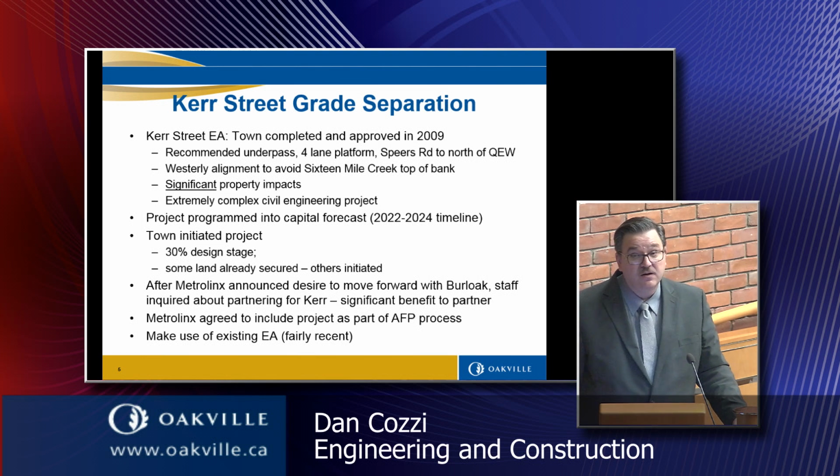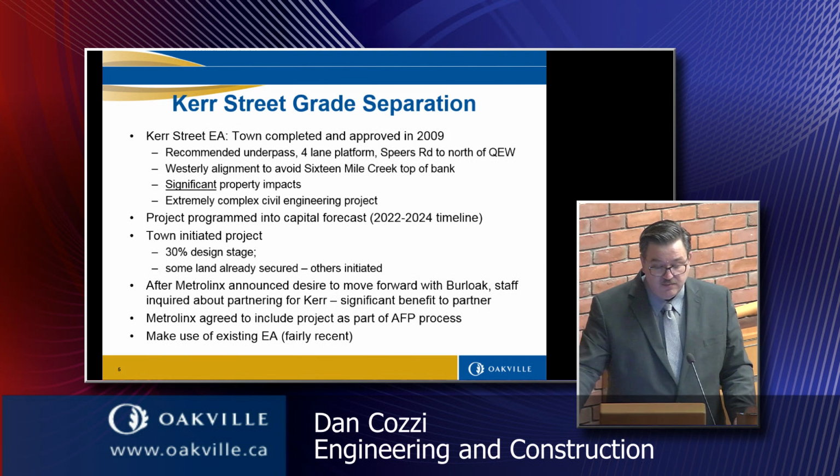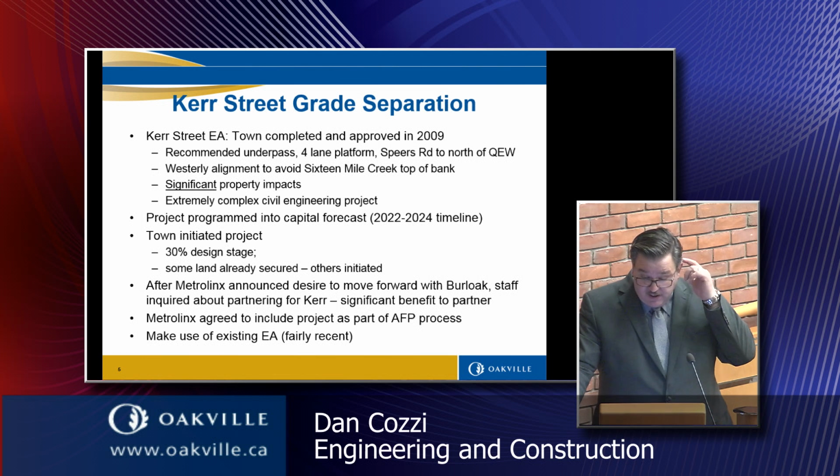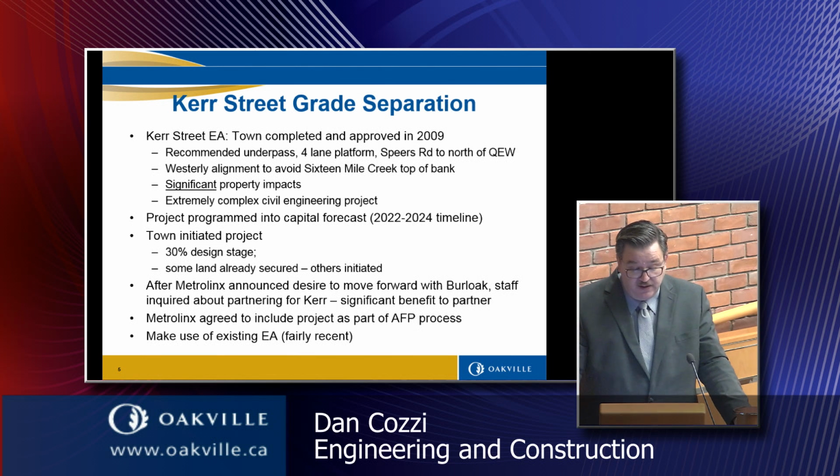And because of that, there are significant, and I've underlined significant, property impacts. There's several properties that are impacted that we're going to have to acquire land. And I'll tell you that this is going to be one of the more complex civil engineering projects the town has ever undertaken. Project has been programmed into our capital forecast, roughly 2022 to 2024 timeline.